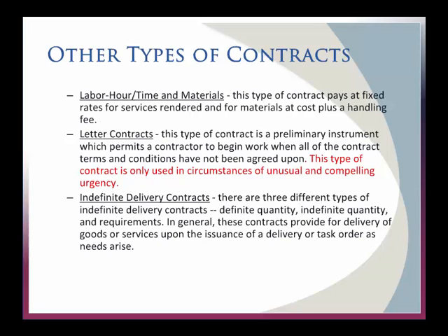There's indefinite delivery contracts. There's something you'll hear called an IDIQ, indefinite delivery, indefinite quantity, sort of an open-ended contract that has some boundaries around. You can't just throw anything in it, but it allows me to quickly throw tasks within a certain bucket of funds. So I have to put a cap on it. So I'm going to say this is a $10 million contract, but I don't know how many things I'm going to do, and I don't know exactly what those things are.